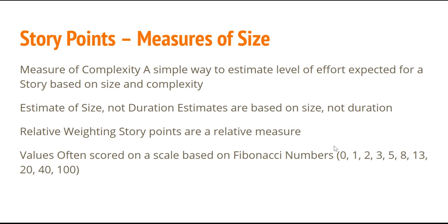In story points, values are often scaled based on the Fibonacci series. So a story can be rated as 1, 2, 3, 5, 8, or 13 story points.